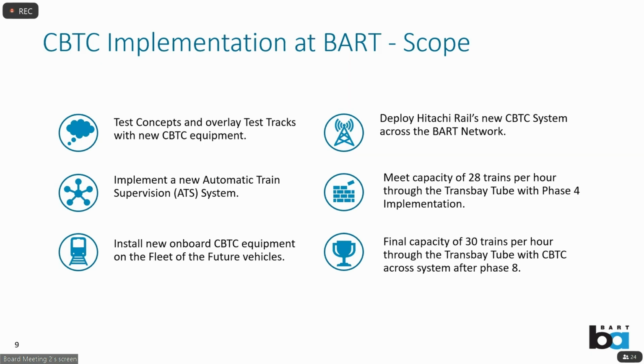It overlays into the existing software at the OCC, and it will enable us to run the system with CBTC in one area and traditional track circuits in the other as we migrate through the system. This isn't a big bang approach. Everything is phased. So we have to figure out how do we run it in a phased approach.